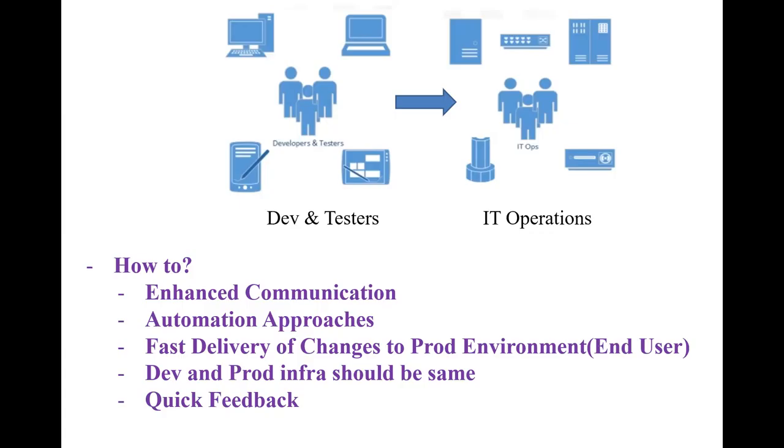Whenever the sprint is starting, there are pre-sprint calls, and during the sprint, communicating with the client, the scheduled meetings. And once the sprint has been completed, a post review of that. All those things we can say are Scrum meetings.